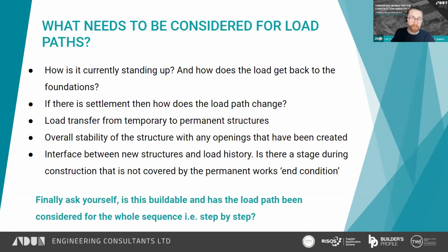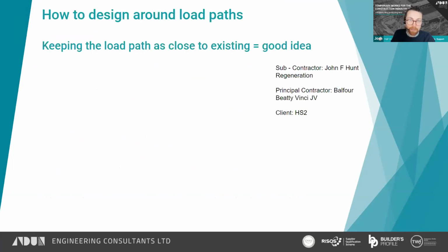And then finally, ask yourself, is this buildable? And has the load path been considered for the whole sequence, i.e. step by step? What we encourage is to visualize the process in your head, and you may spot a potential pitfall, which can be eliminated in the planning stage and before we get onto site.